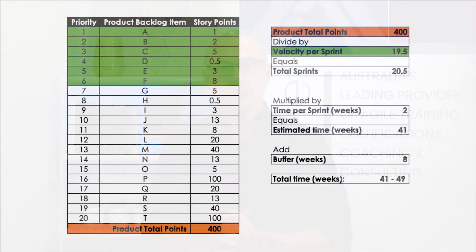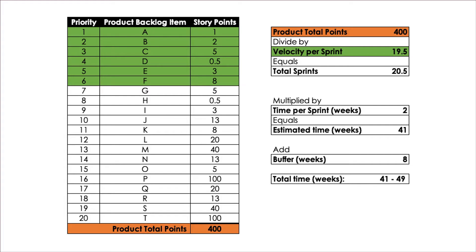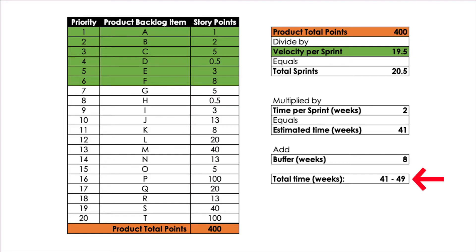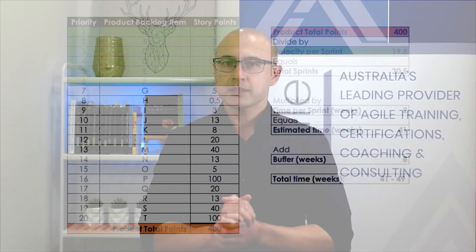So let's just take a look at the previous example that we looked at. So remember, we had 400 story points, we had a velocity of 19.5, we calculated it would take about 41 to 49 weeks to deliver. So to see how we can set up a release in JIRA, let's take this example and put it into our JIRA project.